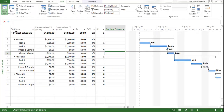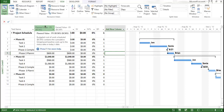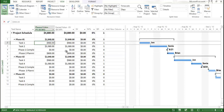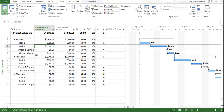Now you can see the template is open. Planned Value is reflected here. If you drag your arrow down, the overall information reflects in a pop-up. Press F1 to learn what is the budgeted cost BCWS. Planned Value is also called PV, which stands for Budgeted Cost of Work Scheduled. Whatever work you scheduled and the cost you assigned for it — that is called the budgeted cost. For example, at the start we assigned $960 for Task A and $1080 for Task 2.